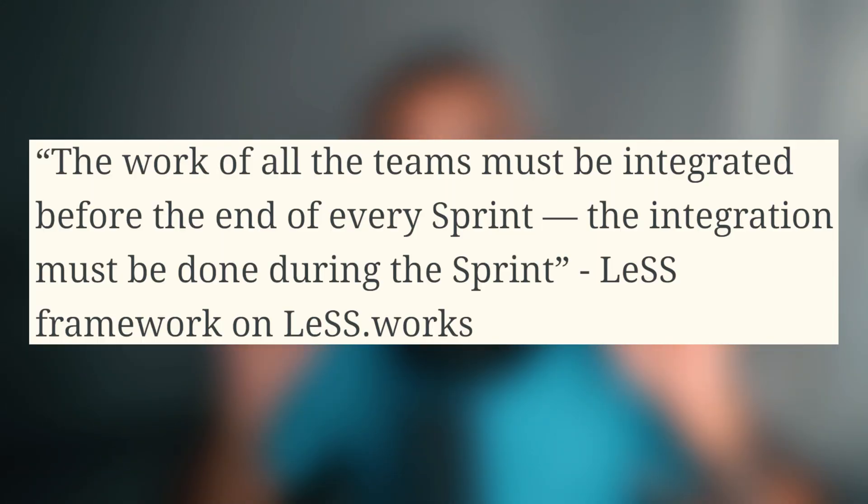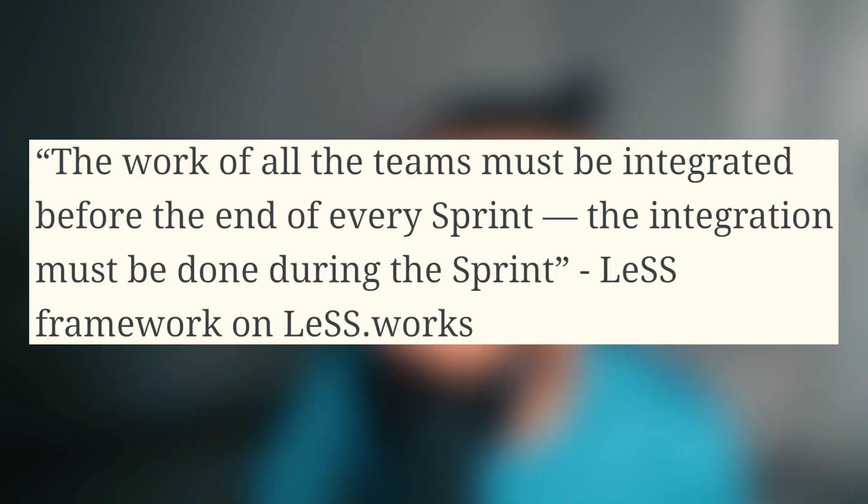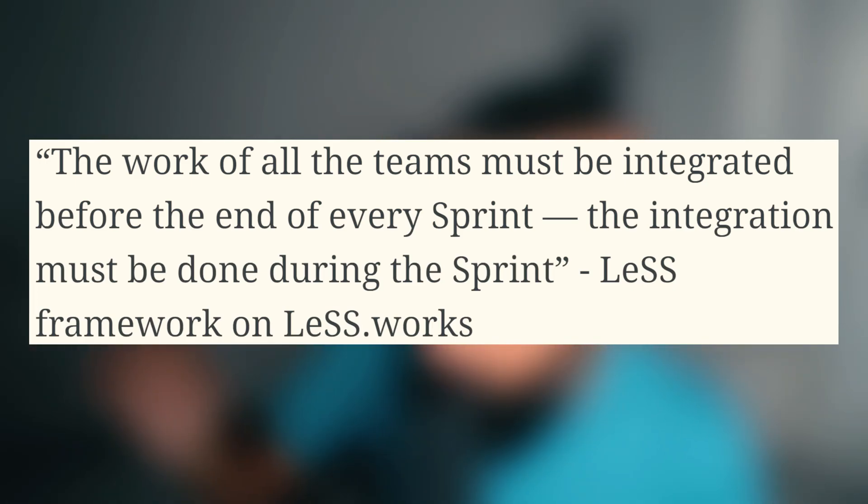The last important point is integration. The work of all teams must be integrated before the end of every sprint — integration must be done during the sprint. The Scrum guide doesn't mention integration specifically, since Scrum isn't limited to development environments. But in LeSS, when working on a shared product with dependencies across teams, the framework explicitly requires everything to be integrated every sprint so that a shippable product increment can be released.